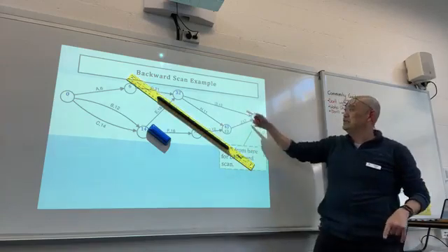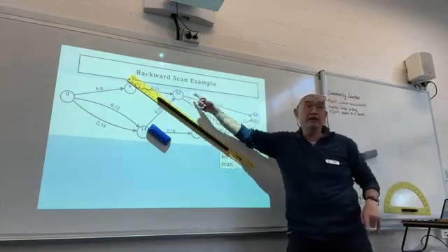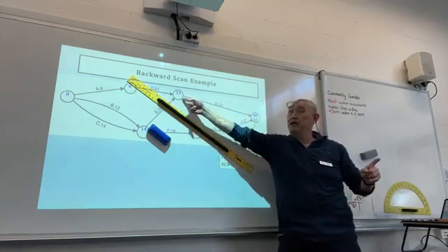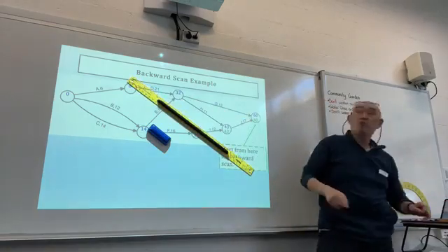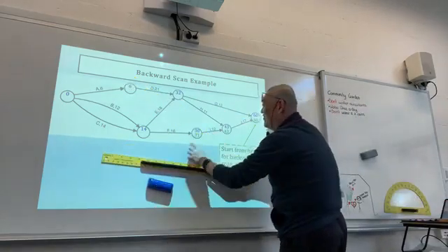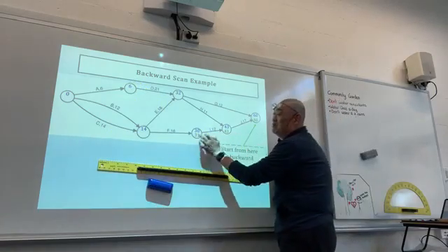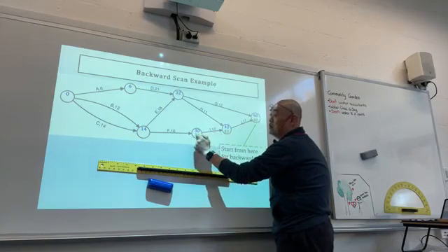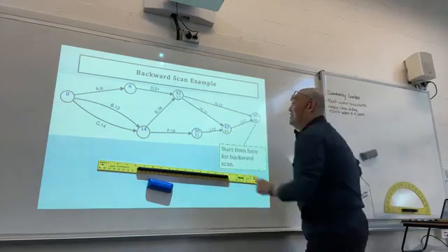Here is 60 minus 12. 60 minus 12 will give me 48. So what is the lower? Lower one is 43 minus 11, that'll give me 32. So you input 32. Oh, actually, I didn't do that first. I did this one first. Doesn't matter. So if you want to do it this way, this is going back straight through here. There's only one arc. So it's 43 minus 12, which is 31. All right? And then go back there. That's 32.